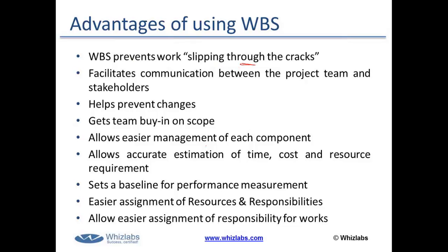So when you have a WBS and you have broken down the work into small work components, there is very less possibility that you would miss some deliverables. Otherwise, if you were controlling the project based on a subjective document, there is always a chance that you might miss some deliverables. Right. So WBS helps prevent work slipping through the cracks. As per PMBOK 5.0, this is the biggest advantage of using WBS.